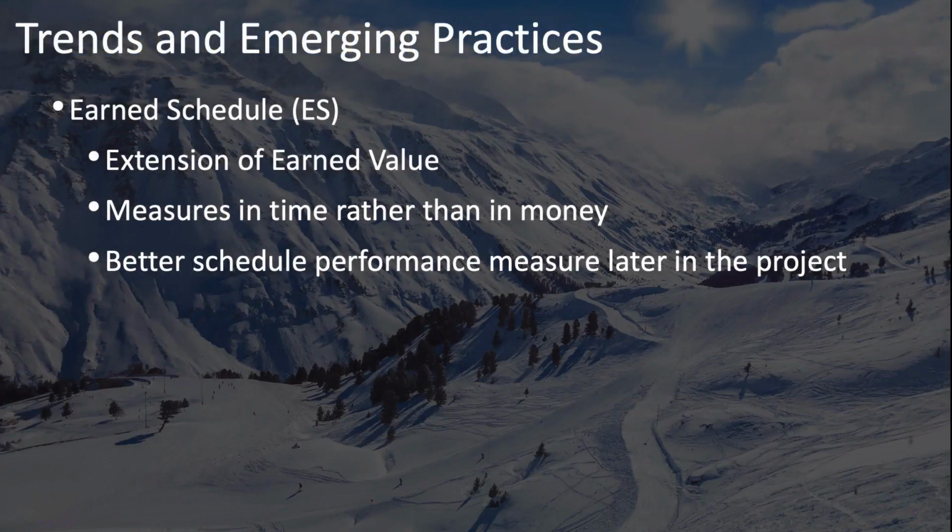A relatively new practice when it comes to cost management is the concept of earned schedule. This is based on earned value management. However, earned value management measures your cost and schedule performance in terms of dollars, whereas earned schedule measures your schedule performance in terms of time rather than money. And this can also provide better schedule performance measurement, especially in the later phases of your project. We'll get to this in detail in the lessons on earned value management.